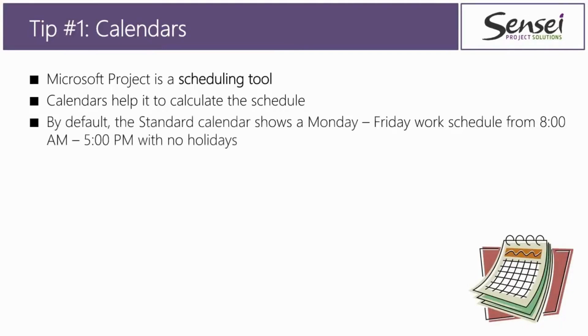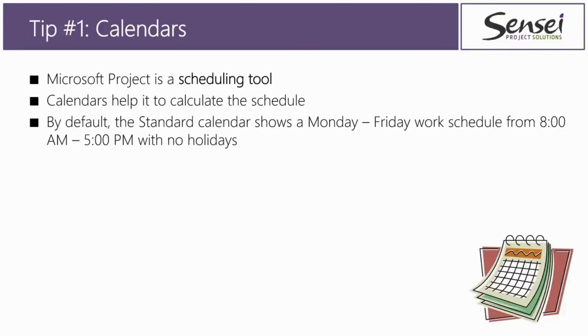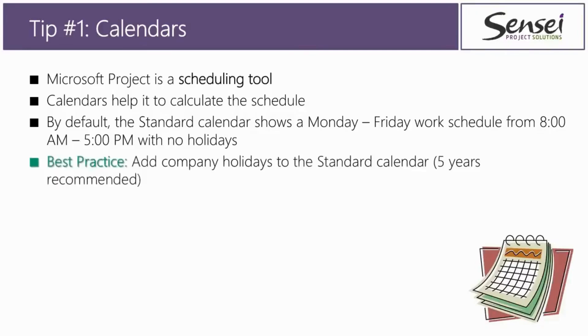By default, the standard calendar, which is used to schedule all new projects, has a Monday through Friday work schedule with the working hours from 8 a.m. to noon and 1 to 5 p.m., and there are no holidays listed on the calendar at all.